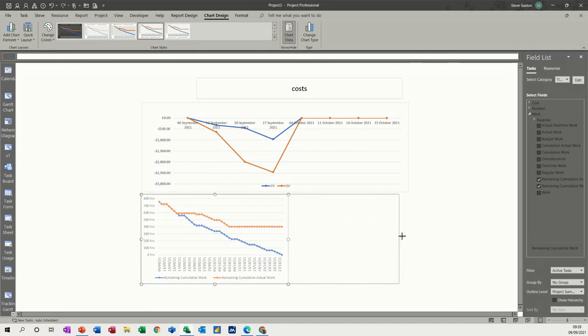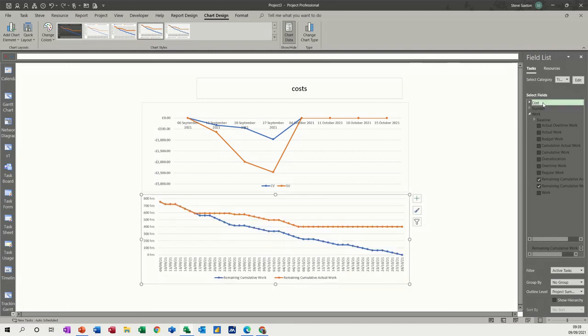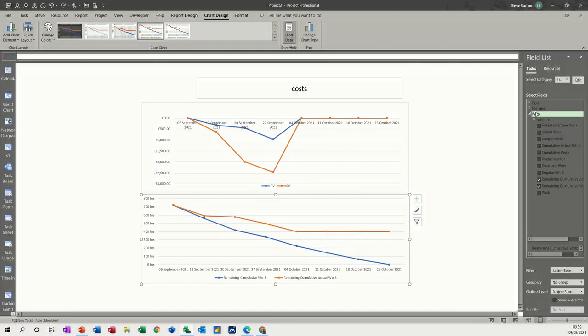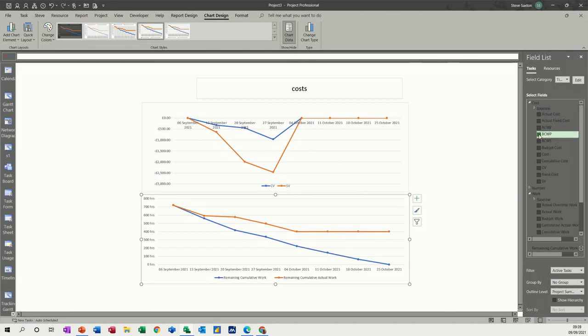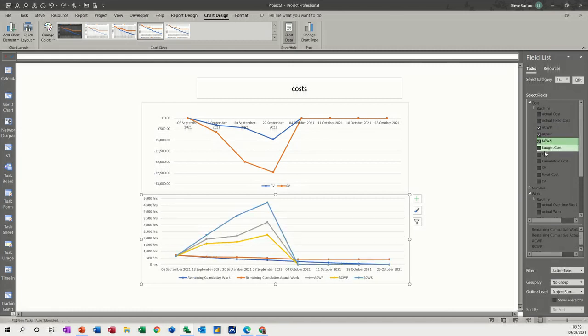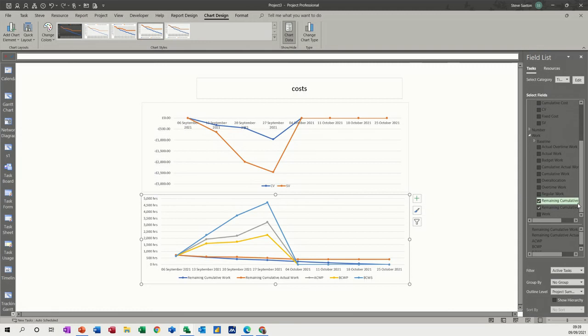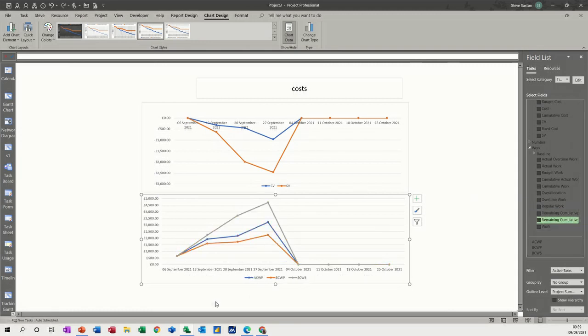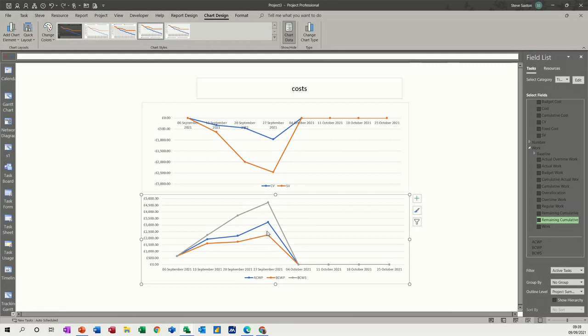Let's move that down there. We just need to change the thing so it's the same as before - Time, edit the time to weeks. We're going for Cost, and then we want these three fields, and then we don't want the other fields. This is very similar to the one I showed you earlier. If this is bigger than that, not good. That's your budget cost work scheduled, budget cost work planned, actual cost work plan. Blue does not want to be bigger than orange.